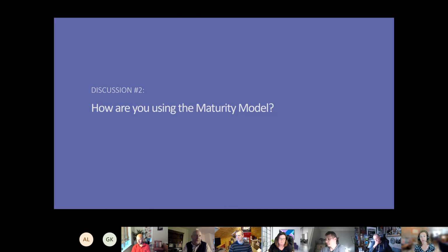So we put them into an opportunities document to say, right, once we've completed phase 1, because you need to complete phase 1 for the client to get trust, all of these ideas came out of the process of completing phase 1. We can now give you a proposal for them, and it's going to cost you X, Y, and Z.